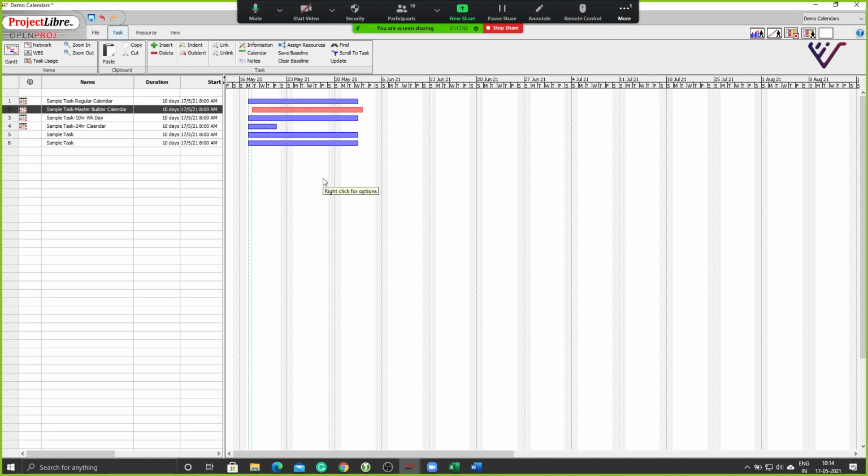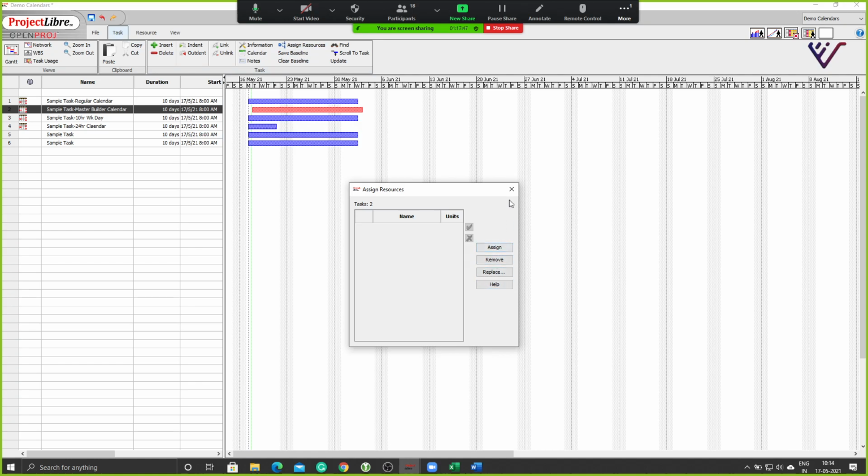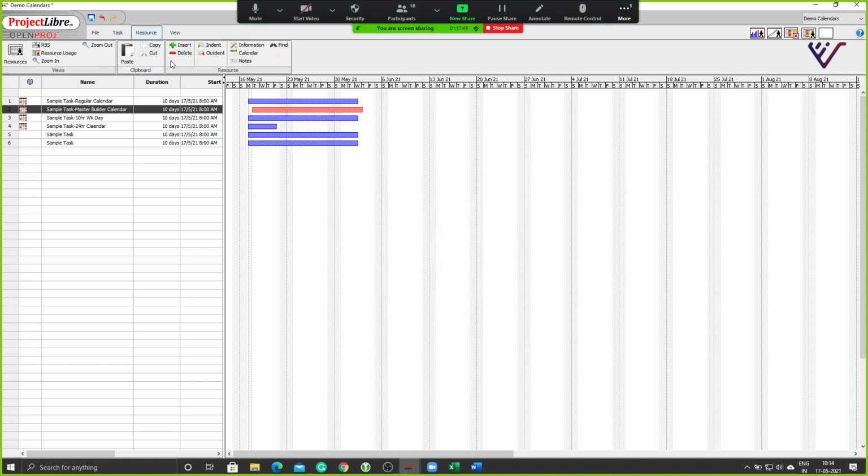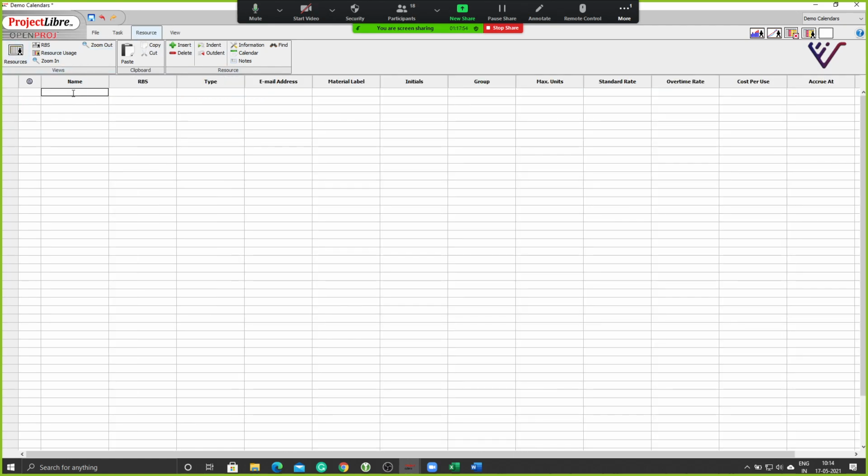Actually, the right way of doing it is not assigning the calendar to the task, but to the resource. So that's the mistake I did. I'll just show it in resources. When you come to resources and you create new resources, let's say we are creating 4 different people now. Okay. Who wants to go next from your class? Okay, so I am just adding 4 names randomly. Who else? Amrita. Yeah, so I have 4 resources now. So let me just explain this with the resources first.